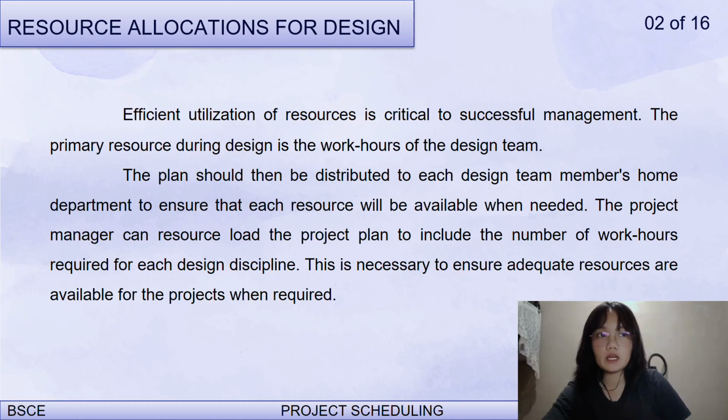The resource plan is simply a histogram of work hours versus time for each design discipline. The project manager should provide the resource plan for each project to the design team's manager. The design manager can then integrate the resource plan of all active projects into their department's demand for technical expertise.